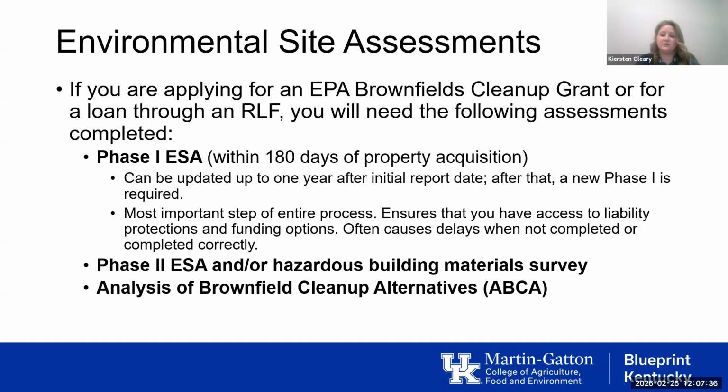And it is the most important step of your entire brownfield redevelopment process, I would argue. It ensures that you have access to liability protections and funding options for your site. And it has caused pretty significant delays in other projects when it's not completed correctly, like if it's not within that 180-day window, or sometimes there are multiple property transfers that have to happen in order to be eligible and have that Phase One.